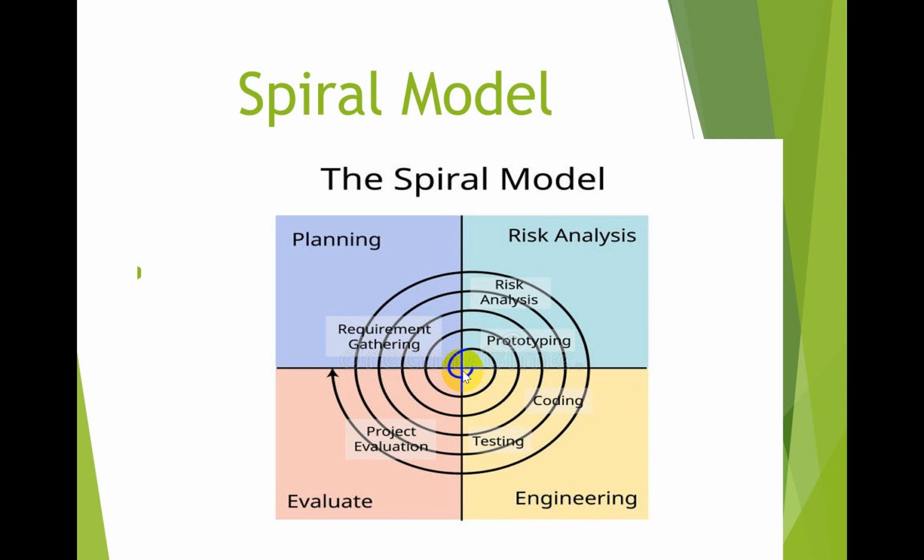Once the cycle has started, they have taken the requirements and started development. After that, if any improvement, additional requirement, or additional feature comes, we can keep all that information for the next cycle; we cannot accept it in the current cycle or current release.